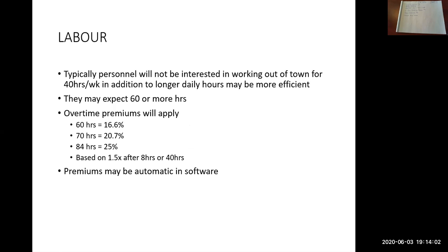So labor costs. Typically workers are not interested in working out of town for a regular 40-hour work week. You would be hard pressed to find somebody that will leave their home and their family to work out of town for 40 hours a week. They want to work longer hours, more days to make more money. So they may expect 60 or more hours a week. Again, that will come down to your agreement with your employees.